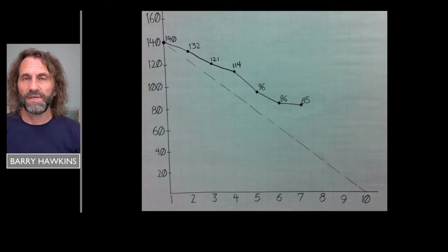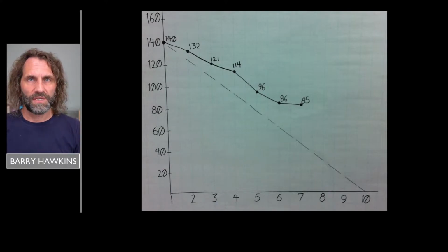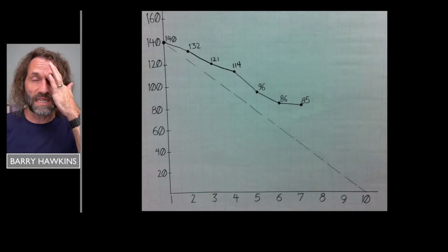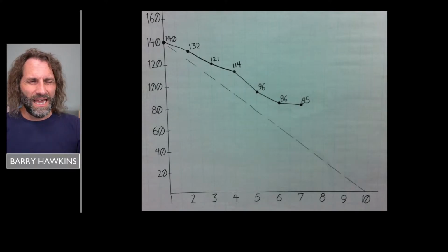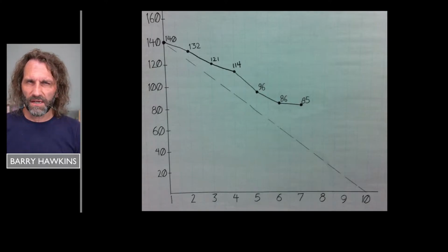And if that means some of these lower down items carry over, that's a better choice than having everything come to the end of the sprint or the development cycle and none of it completes, because we just kept hopping back and forth. So your burn down chart gives you that prompt and somewhat of a safe space, or a safe artifact, to look at and say, hey, I know we're all saying we think it's going to be okay, but based on what we're seeing here, let's dig in on that a little bit and see, do we really feel like this is going to go well?